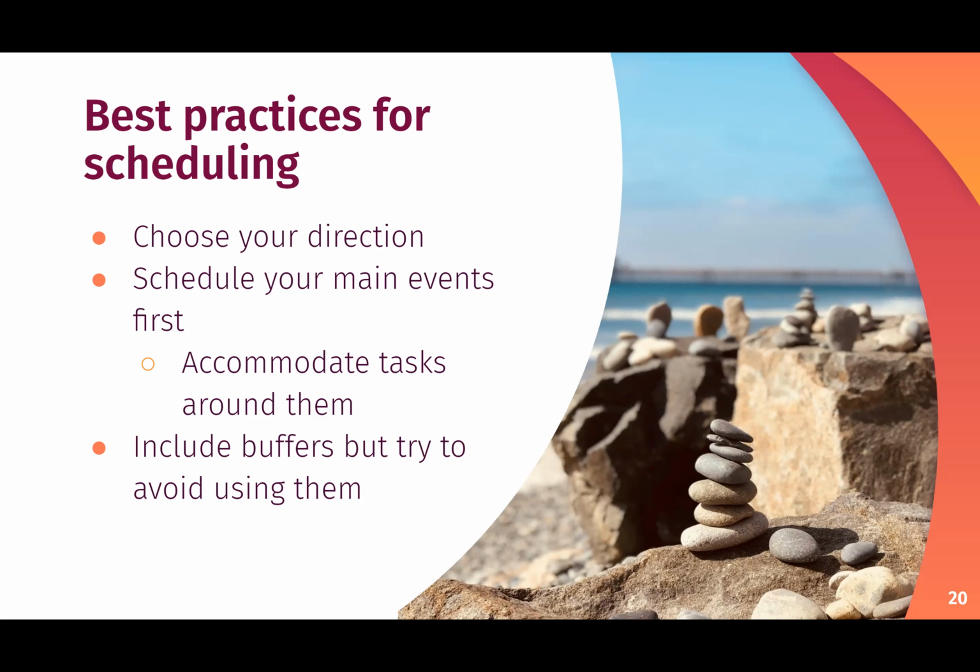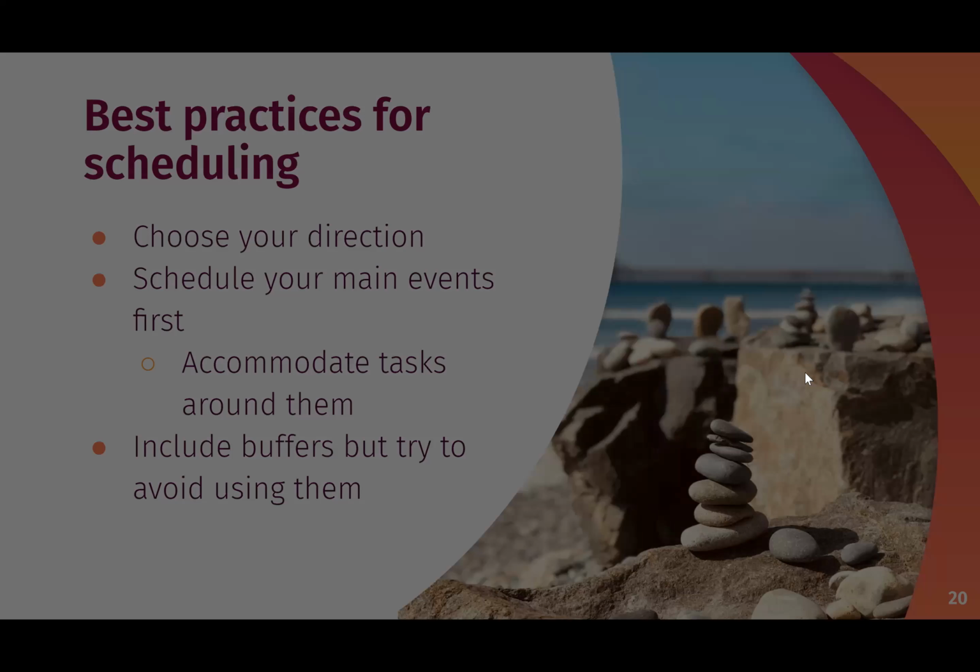But definitely think about having some buffers. So if you know that you need to send your REB by July 1st, maybe you want to try to have it ready a week before. It doesn't always happen, but it's good to have those buffers because it allows you a little bit more breathing room. And if something goes wrong, and something will go wrong at some point, then you know that you're able to work with that, and it will still be on time if we need to.